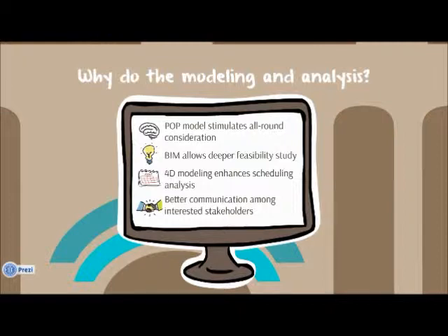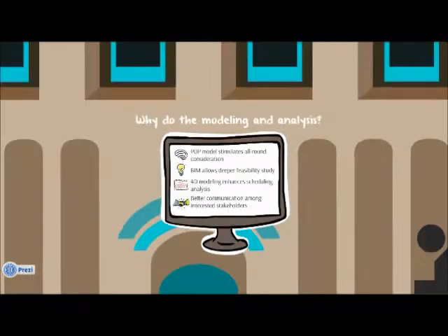The 4D modeling helps to give better scheduling because it shows the whole process of the demolition and also the construction. It can identify some potential clashes in the schedule, and people can be notified of that and prevent those problems.